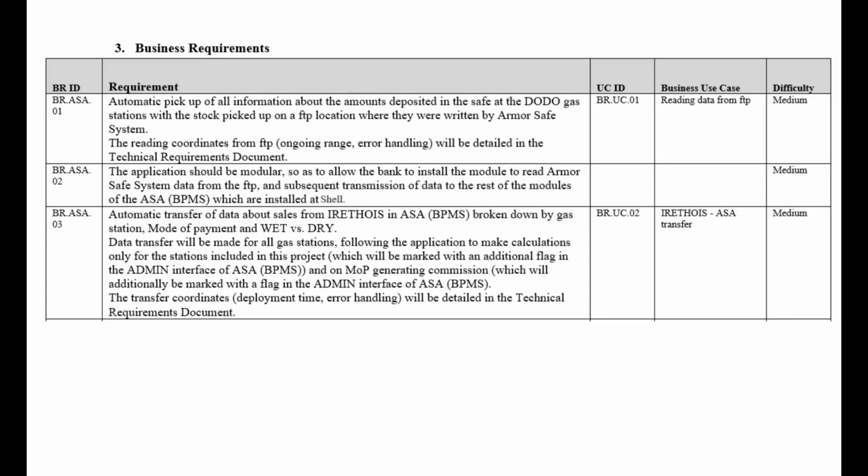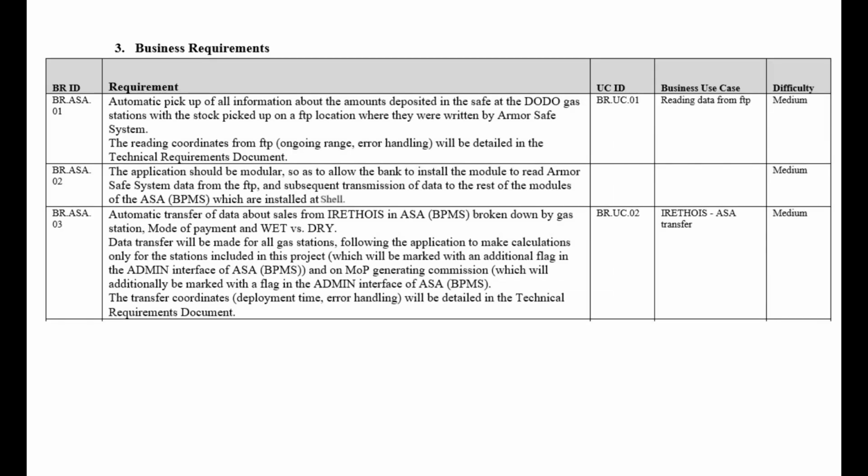Next section will be the business requirements, which will include the following. Functional requirements: detailed descriptions of the functionalities and features required. Non-functional requirements: specific criteria related to performance, security, usability. Here will be listed the performance requirements, such as how quick or the speed of a task happening once pressing a button, etc. Data requirements: information about data inputs, outputs, and storage needs.